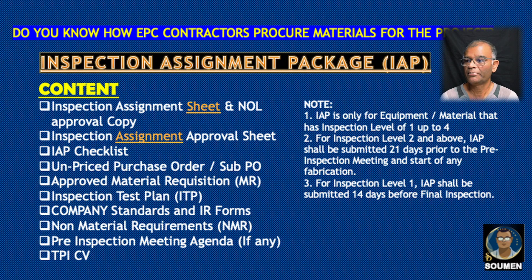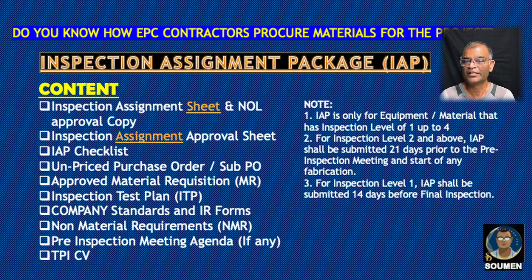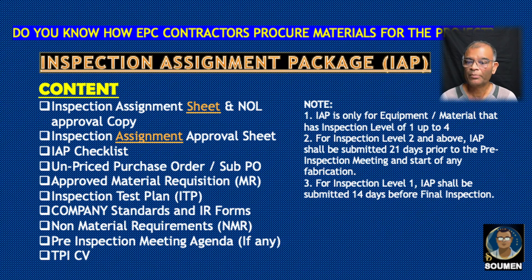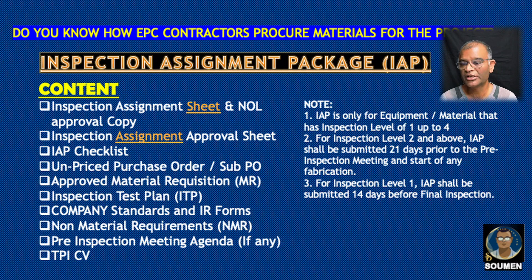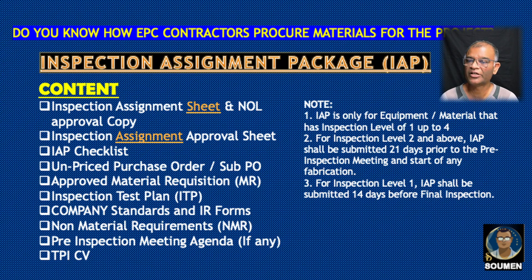The Inspection Assignment Package (IAP) must be prepared; it is required from Level 1, 2, 3, and 4. The contents of the IAP include: inspection assignment sheet, no-objection letter approved copy, inspection assignment approval sheet, IAP checklist, unpriced purchase order, sub-PO, approved material requisition (MR), inspection test plan, company standards and IR forms, non-material requirements (NMR), pre-inspection meeting agenda (for Level 2, 3, and 4), and the third-party inspector CV who will represent the vendor inspection department.